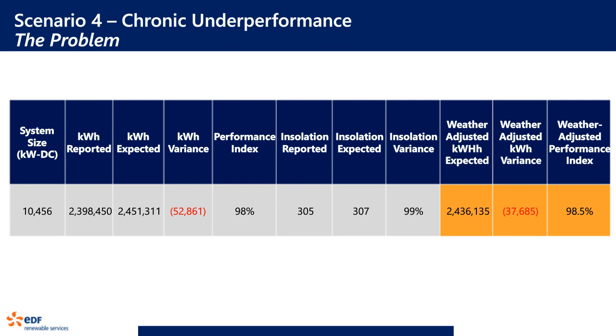And ideally, this problem would have cropped up in the first 2 years of a project when we were looking at having an EPC performance wrap, in which case it would have been great, right? You file a formal warranty claim with your data, and then manage the problem through your EPC. In this case, it had already expired, so we really are looking at something that is very difficult to work through.